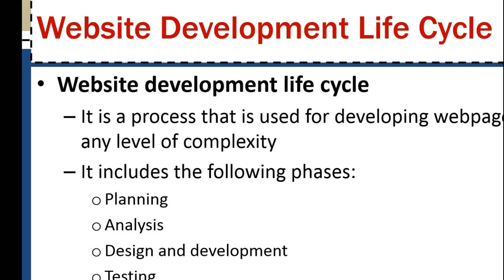You need to have comprehensive planning and analysis to make sure that the developers can provide whatever the user wants. If somebody asks you to develop a website and you start coding it from the beginning without any planning and analysis, you're going to have a lot of risk of missing some of the important information that the users want. Then it's going to be more expensive to fix those problems. It's always less expensive to make the correction at the early phase than the later phase. That's why the planning part of the website is very important.